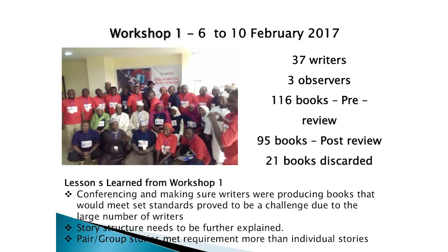And then we also had the number of writers that we had. It was from that first workshop we realized 37 writers for one writing trainer was a bit large. So in our subsequent workshops, we cut down on that number. The lesson we learned from that first workshop was that there was a need to conference regularly with the writers if we needed to produce books that would meet set standards.